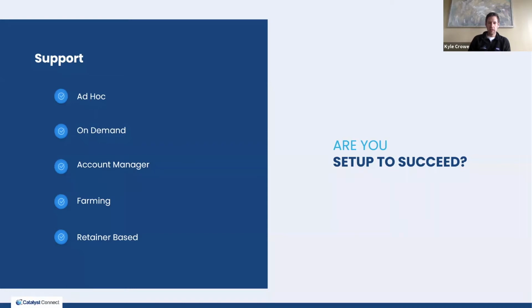So we really stress user acceptance testing for a number of weeks, double entry potentially, depending on the system, just to try to weed out any potential user feedback questions or concerns in the weeks prior to the go live. So what that looks like is a group, anywhere from 2 to 10 test users in the system, just to start getting their hands on Zoho, getting into the weeds and start using the system, so that when we move the full user base over to Zoho on that go live day and that go live week, we have as little go live support as needed.